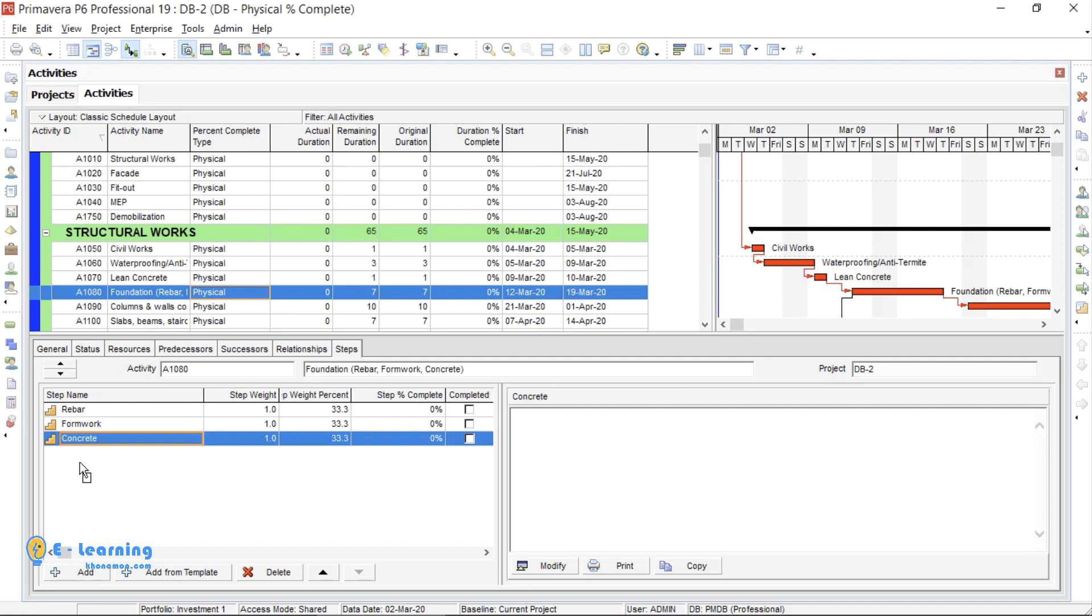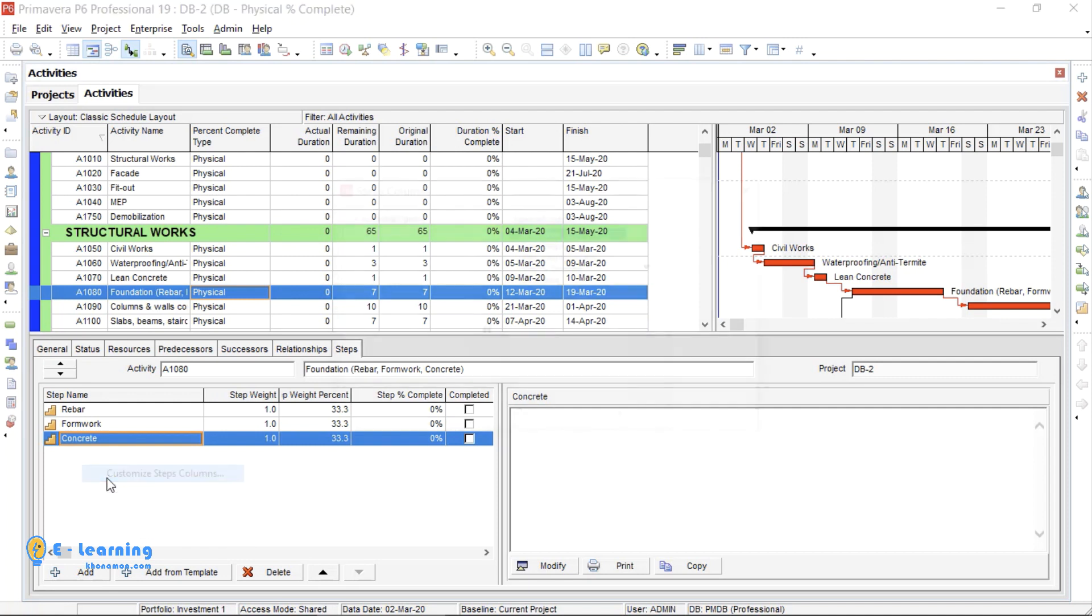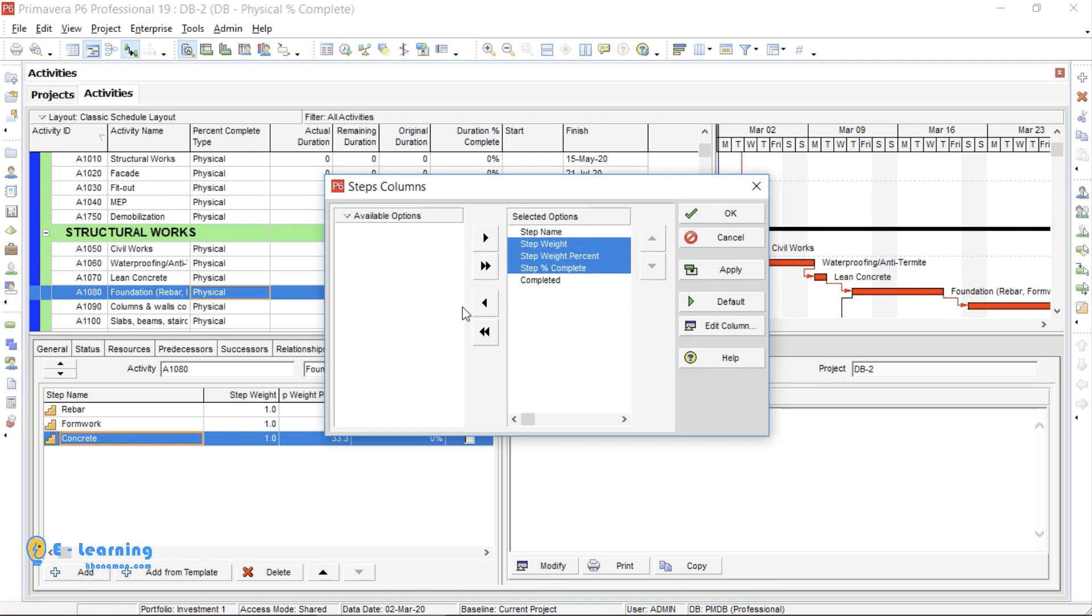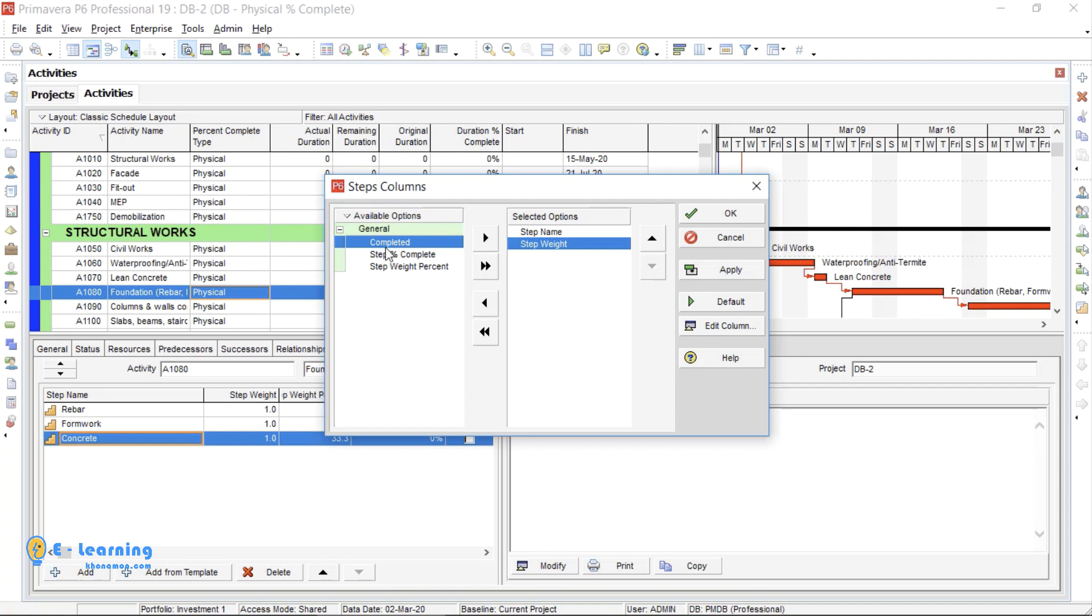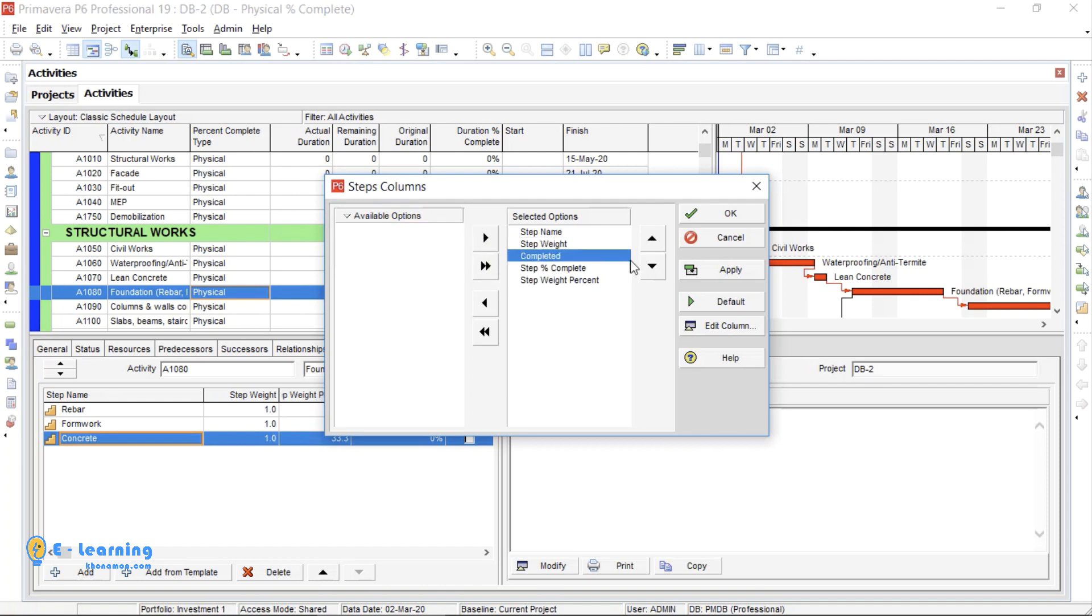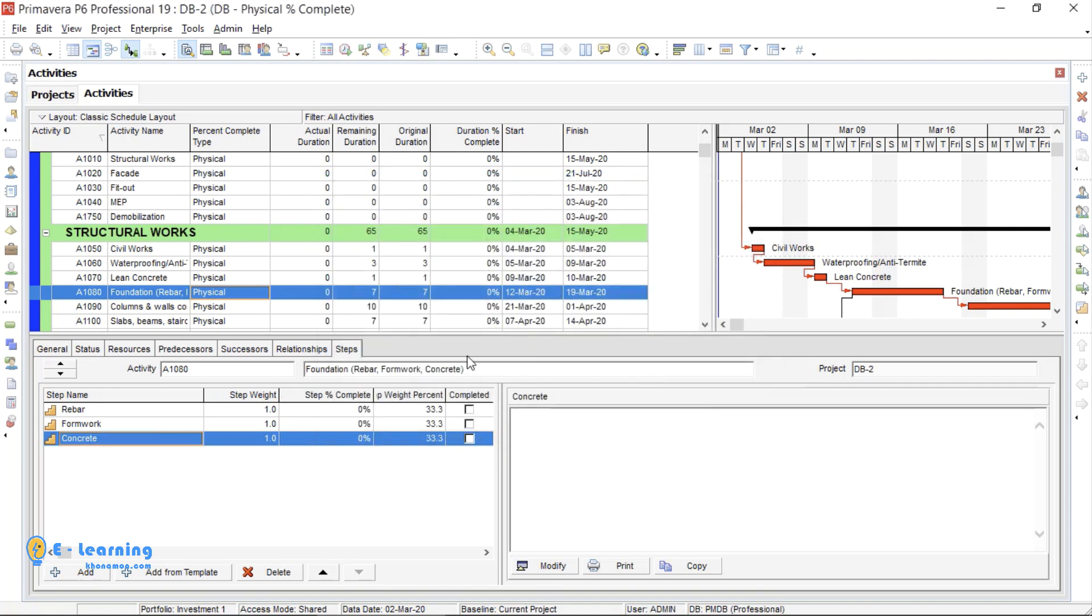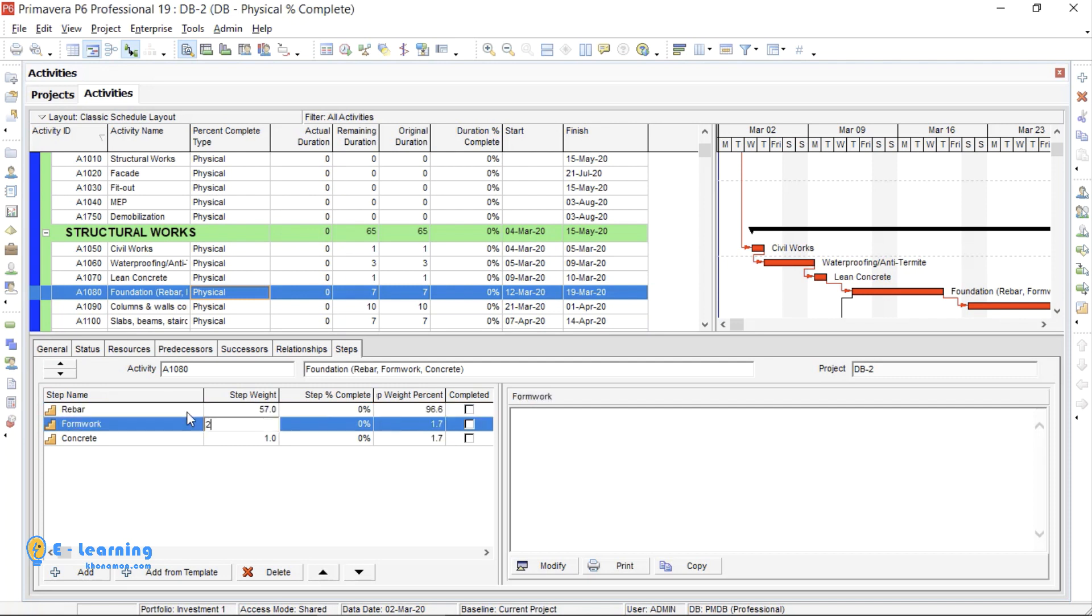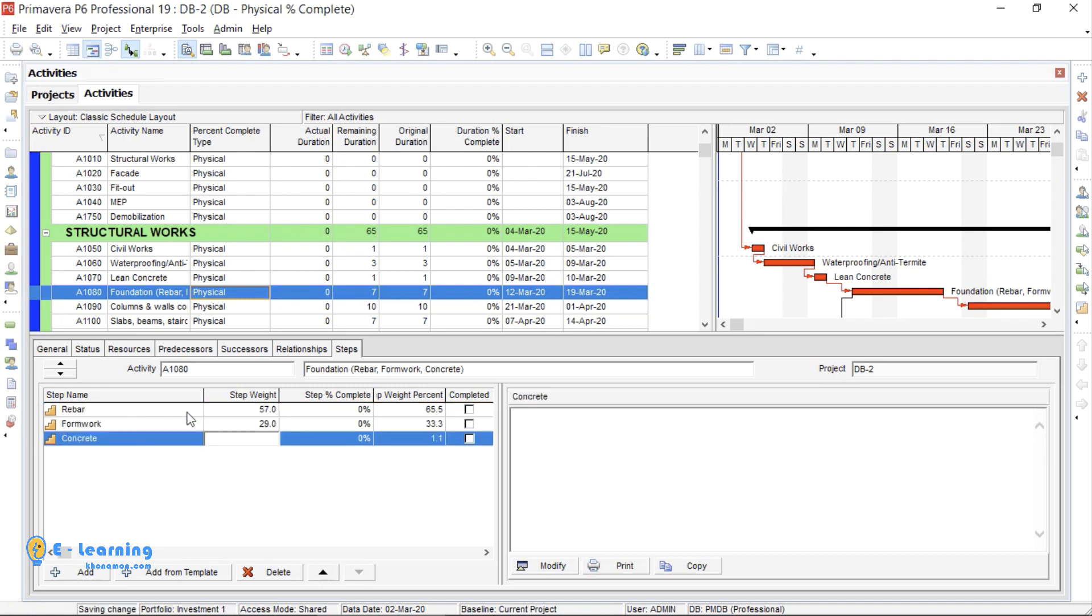I right click here, then Customize Steps columns. They are selected already. If yours are not, from General, select All, then OK. By default, Step Weight here is 1. I define Step Weight 57, 29, and 14.